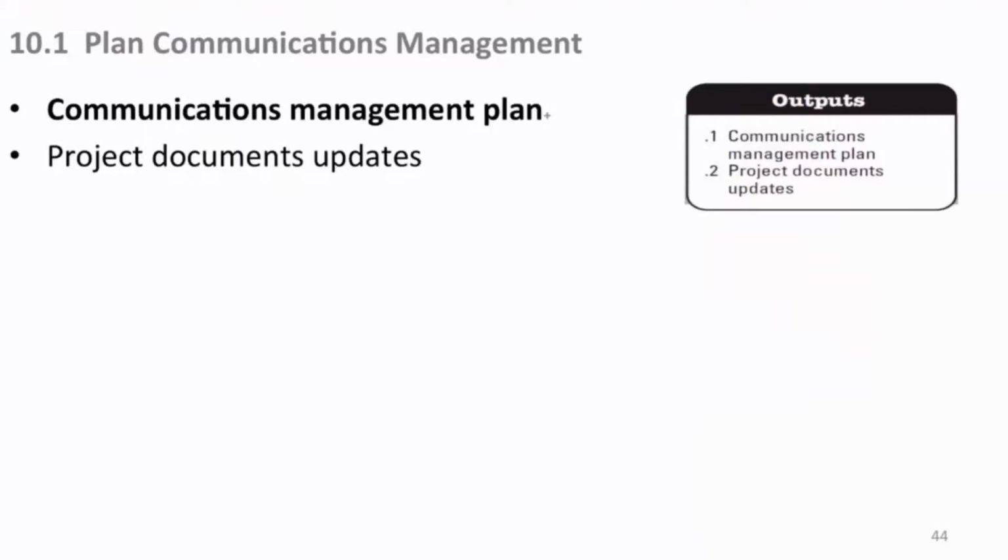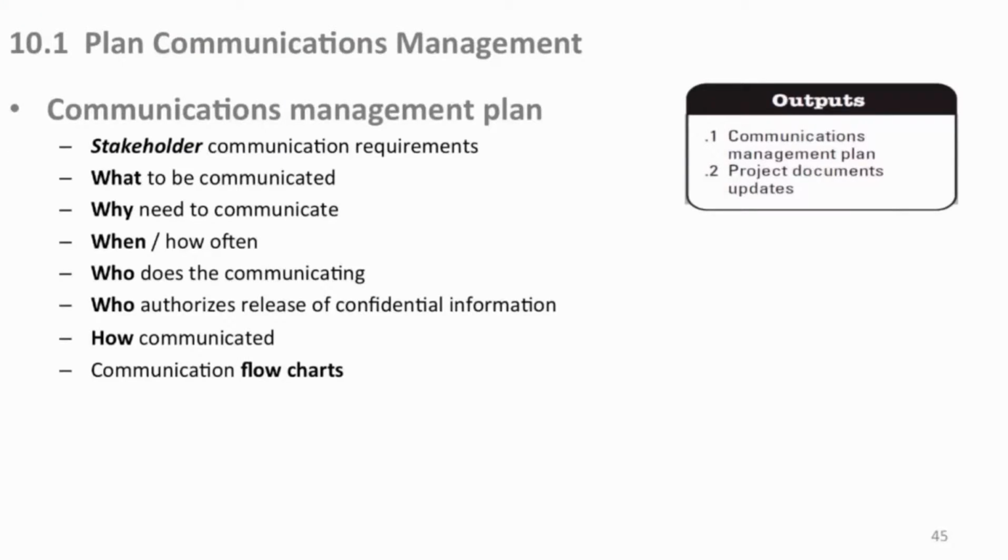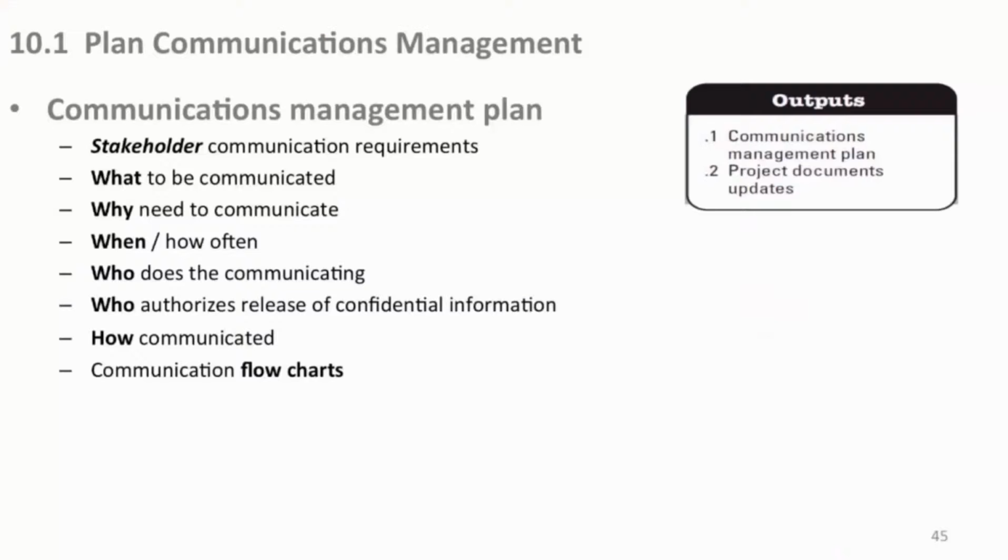So what's in the communication plan? Your stakeholder is your primary focus in here, how you're going to communicate with them, because you're doing the project for them, maybe for certain of them more than others, but basically you're doing it for your stakeholders. So in the communication plan is how you're going to communicate, what you're going to communicate to them, and why you're communicating it, because again, you've got to have value. Why am I telling you this? And conversely, why am I not telling you something if they ask? Well, that's in here too. And then, when are you going to do it and how often?